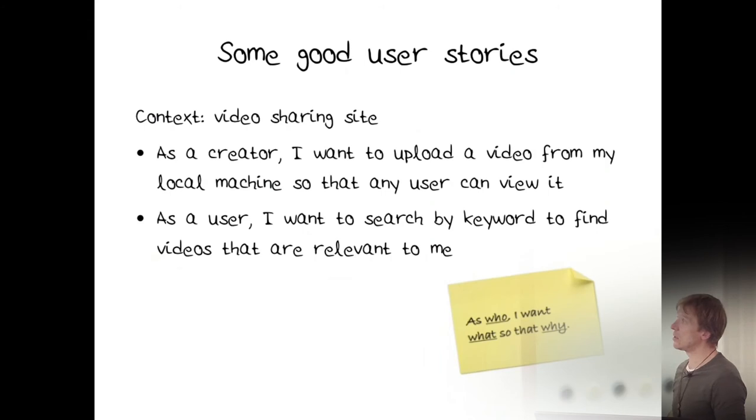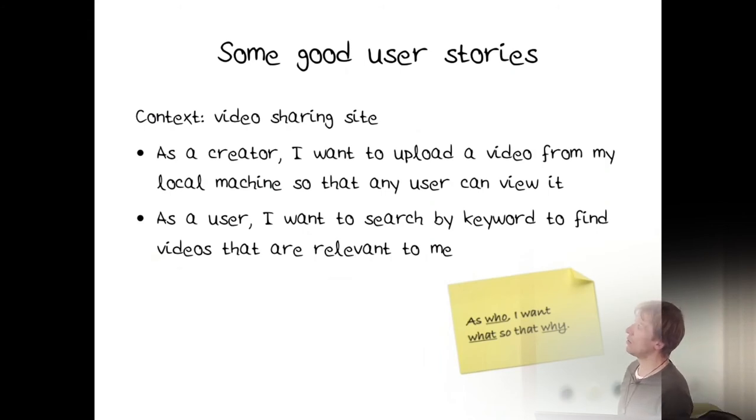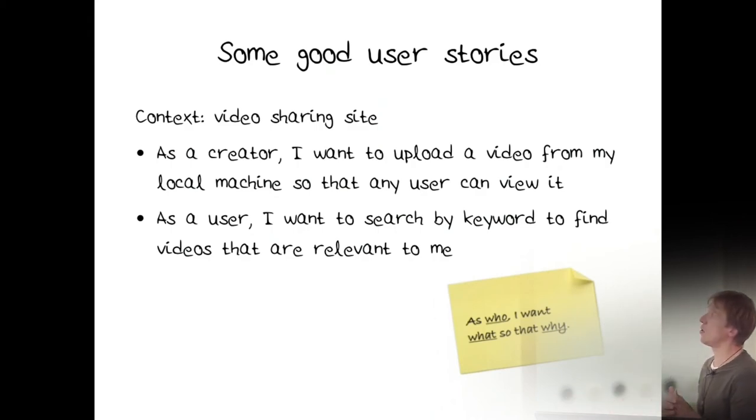So, some good user stories. This is from a video sharing site. It says, as a creator, I want to upload a video from my local machine so that any user can view it. As who, I want what, so that why. Second one, as a user, I want to search by keyword to find videos that are relevant to me. Perfectly okay user stories.